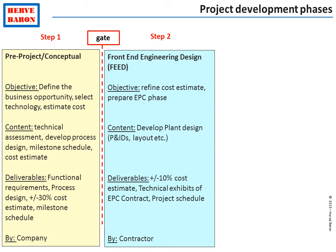Step two is called the front-end engineering design. It involves a specialist contractor — so this time the oil and gas company does not do this internally, but enters into a service contract with a contractor specialized to develop such preliminary plant design, whose objective is to refine the cost estimate up to a precise level of plus or minus 10%, which is the level required to take the final investment decision at the end of step two.